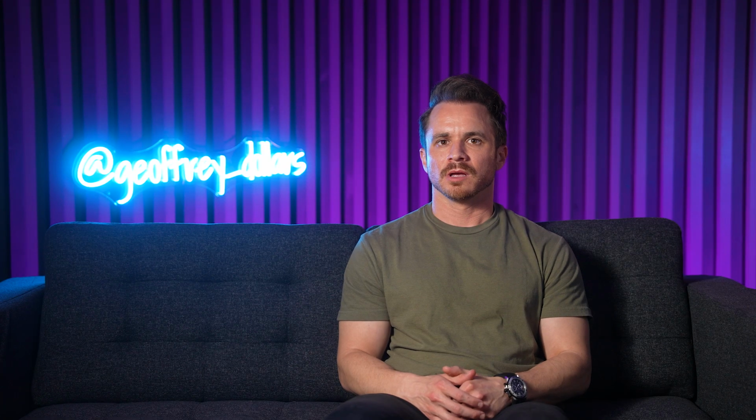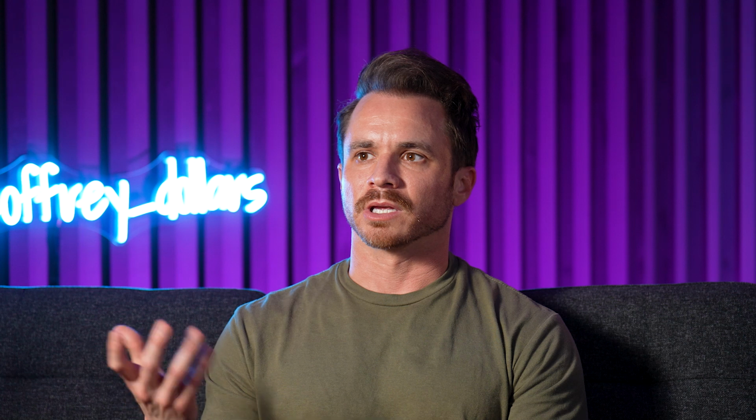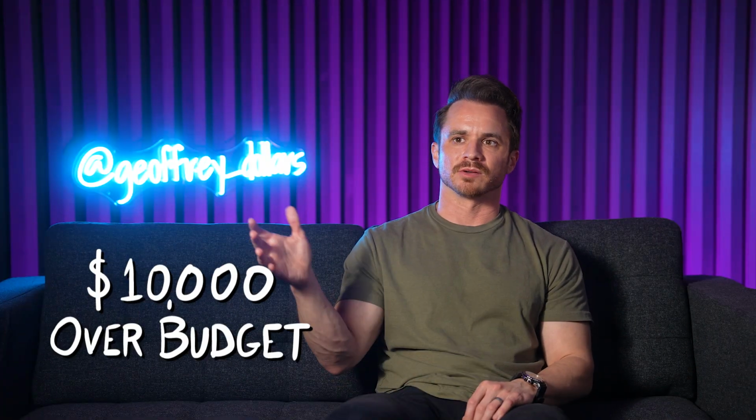The budget wasn't extremely tight on this one, but we always try to stay within the number that we determined at the very beginning, because then you get into budget creep, is what we call it. Little instances where you go over budget here and there add up to an overall project figure that you didn't really account for. So if you have $500 here, $1,000 here, $1,500 here, pretty soon you've spent $10,000 over budget, not in one place specifically, but throughout the entire project.